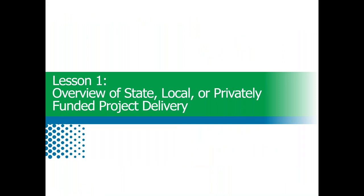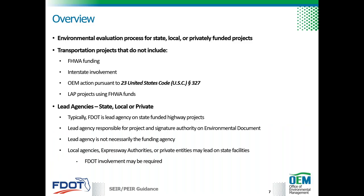In Lesson 1, we'll provide an overview of the process and discussion of the lead agency responsibilities. Environmental evaluations are required for all state funded projects to comply with state and federal laws and FDOT policy. State funded projects are those advanced through the FDOT work program using only state transportation allocations and don't require federal highway administration funding or OEM action pursuant to 23 USC Section 327. Part 1, Chapter 4 of the PD&E manual provides guidance on the federal process.